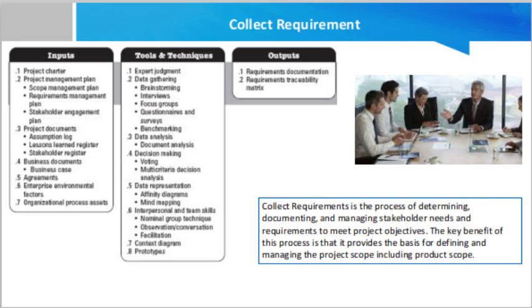Many organizations will create one common requirement specification for both product and project. Certain organizations will produce two separate requirements specifications. One is the project specification, which contains the requirements for the project, such as staying within budget, timelines of the project, etc. The other is the product requirements specification, which contains the product features and functions. As a project manager, it is good to be on top of both the project and product requirements.